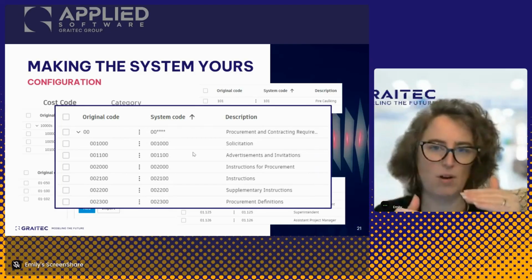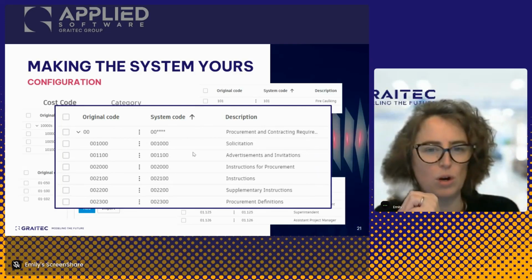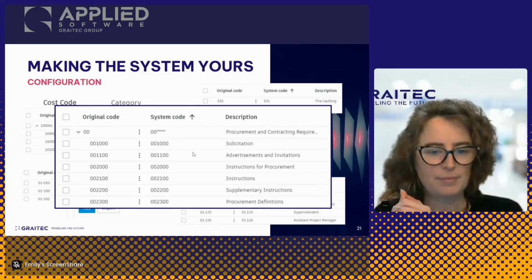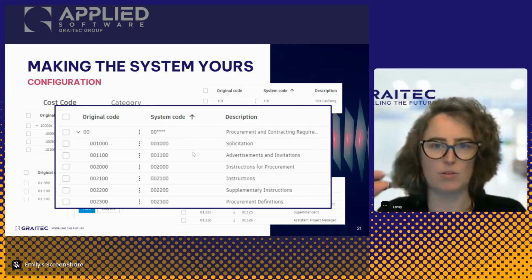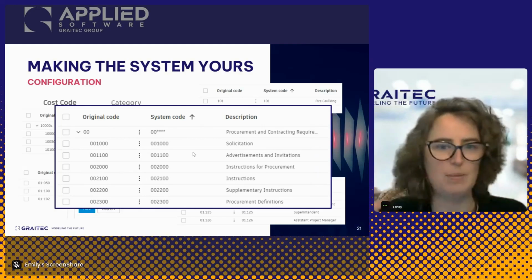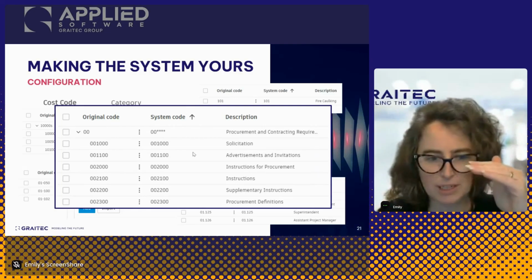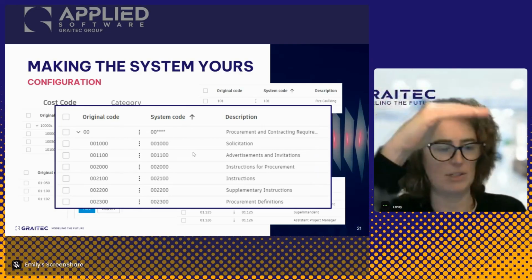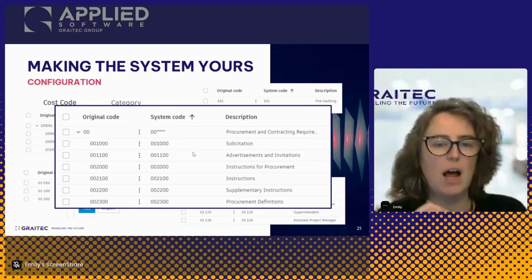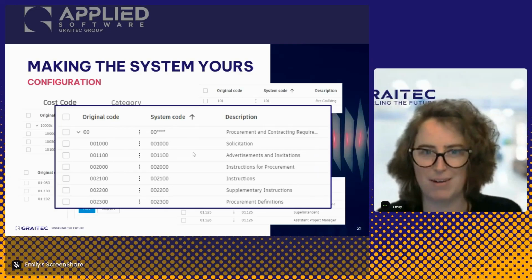That's where we get this hierarchy, and those individual line items for all of the estimators' work, they can stay in the system, but really your budget is rolled up to that top category of rooms, MEP, roofing, landscaping, and then all of those little bits and pieces of it are for your information only. So your actual budget gets pared down to 40, 50, 100 lines, and it can still be quite large, but it doesn't have to be as big as, let's say, what your estimators might go through on their end.